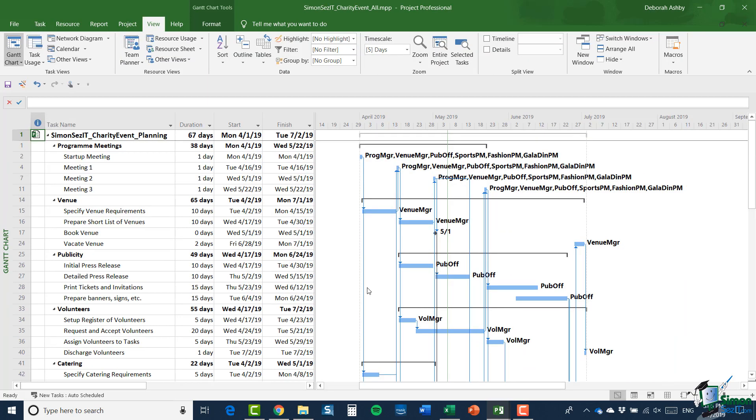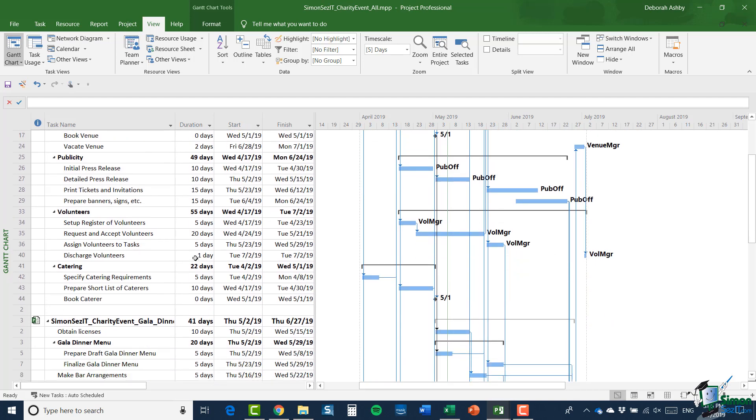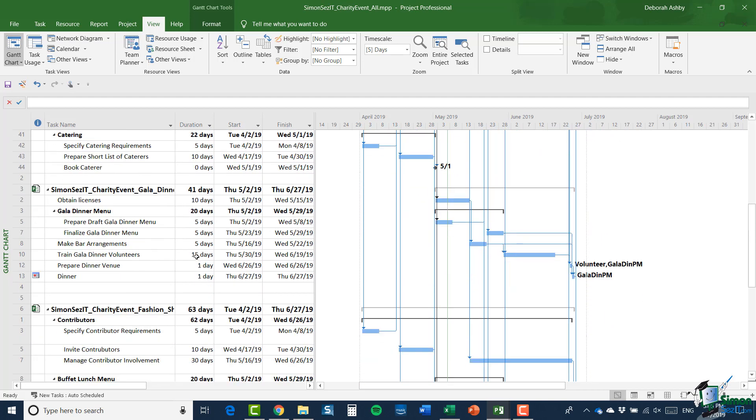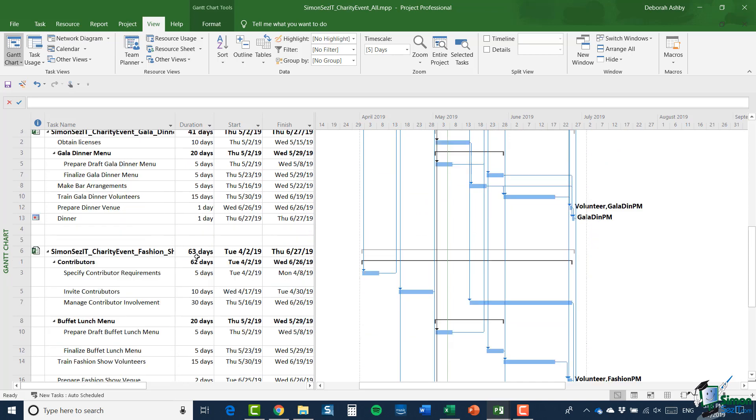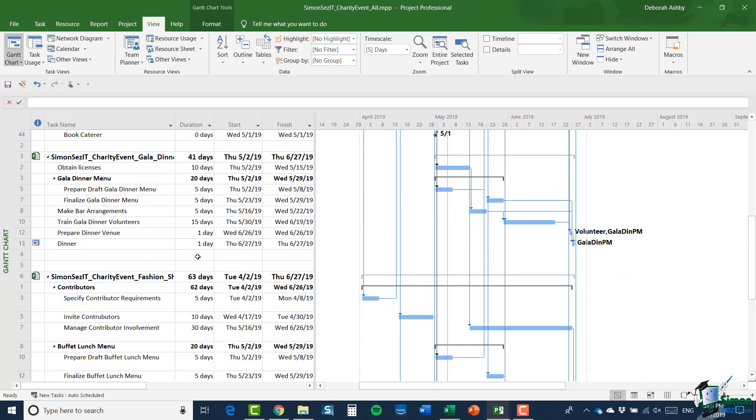So now I have access to charity event all and within this file, I have the four constituent sub-projects that are included within the master project. Now, one very important aspect of this is that all five projects, that is the master and the four sub-projects and the resource pool, are all in the same location. So that's the situation in which I can do this. So let's take that as an ideal situation. I'm working in a shared office looking at these projects in a shared location.